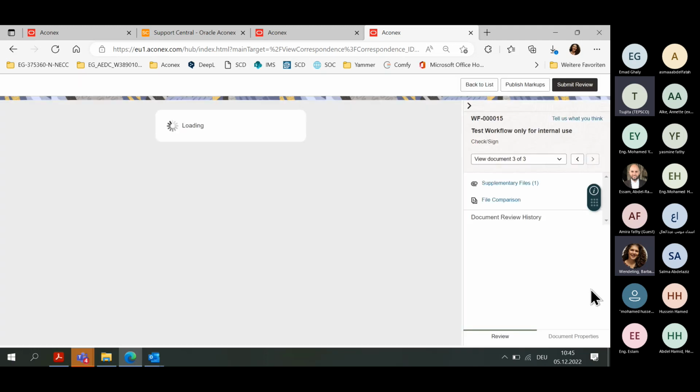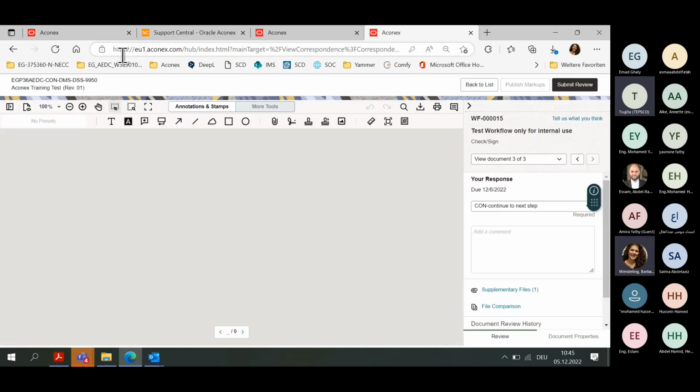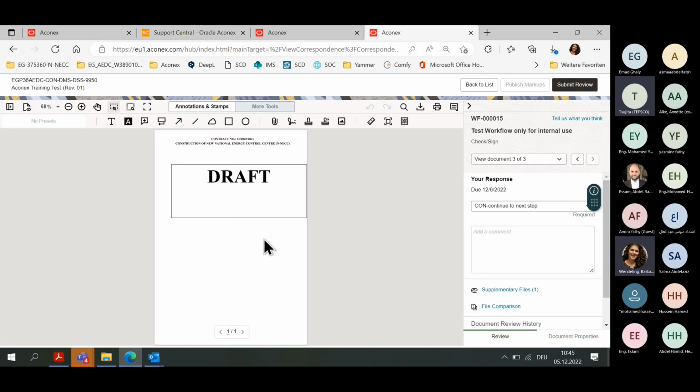So that means we click on the pencil, then the document submittal sheet opens. Here you can see we only use now these draft numbers, because we cannot delete these documents from Aconex later on. Therefore, we decided to use at the moment numbers with 9980. So when we start with the documents, we will start with 1, document number 1, 2, and so on. So, and this submittal sheet must be signed now, and this is really very easy.